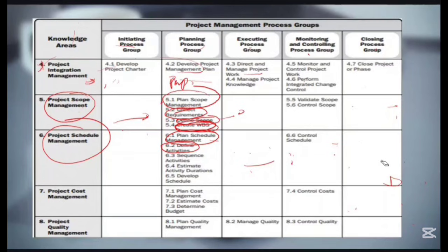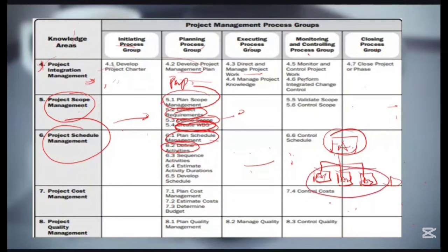So define the activity. Know the specific actions that we have to take. These are the activities. We define them. So the idea is this: if I have a big task A, and I have to do A1, do A2, do A3 to achieve A, this is your lowest level. These are things you do. If I do A1, A2, A3, I've done A. So I don't do A, I do the lowest level. You go down to the lowest level and you perform the work from there. And as you perform the lowest level activities, you are achieving progress as you come up.